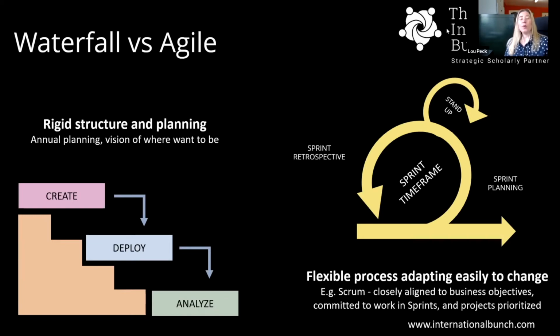It's more on an annual basis in the respect that you would talk about, say, right, these are the business's objectives for the year. And this is what I feel the main projects that we need to be doing. And I'm not going to go into the level of detail, but I feel these are the main projects that we need to be doing to support those objectives of the business. And then you plan per quarter. So you say, right, these are the ones that we've identified are the projects that we're definitely going to be working on this quarter. Now let's look at saying, what are we actually going to do for these? And you do it on a month by month basis.